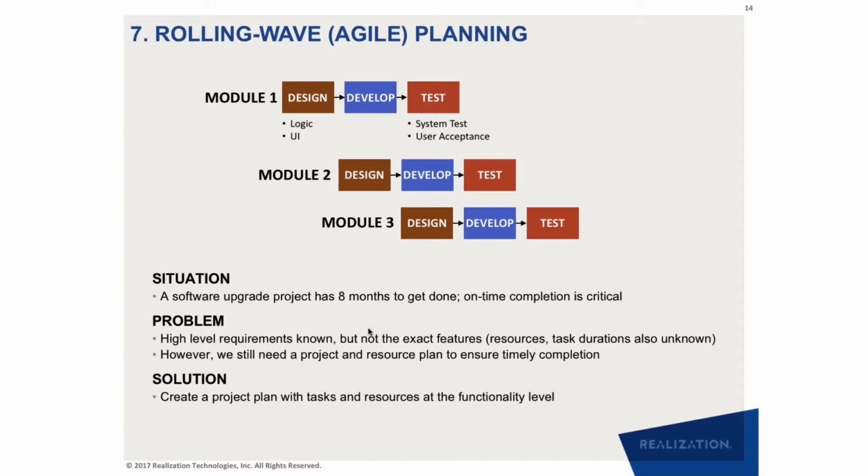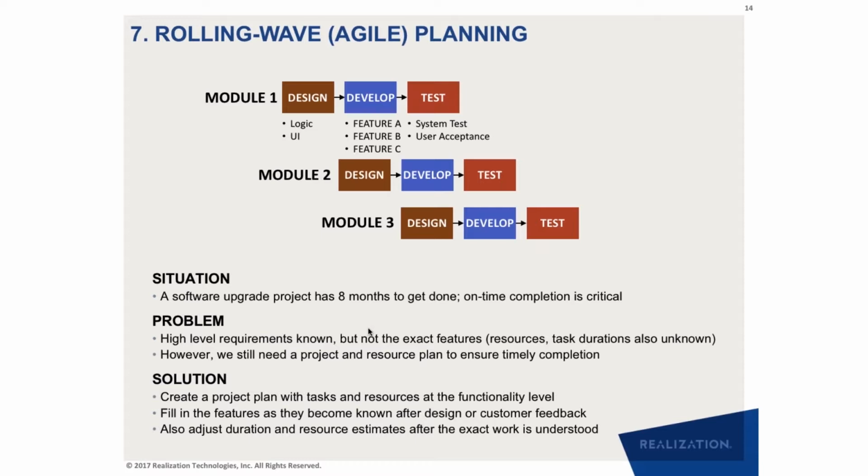So instead of breaking this up into different streams, Sanjeev, if you can, the solution here is that I need a planning methodology that allows me to build the higher structure, in this case at the module level. But the details underneath, I need to be able to update in real time without going through an entire replanning process. So I need a structure that gives me a roadmap of what this project is and how long it is going to take. With the 2-tier task approach, I can add the details of each of these tasks as I go along.